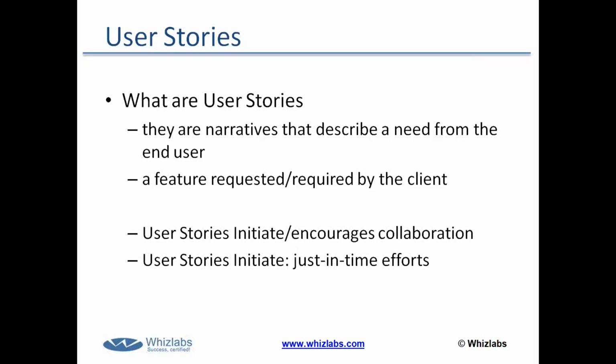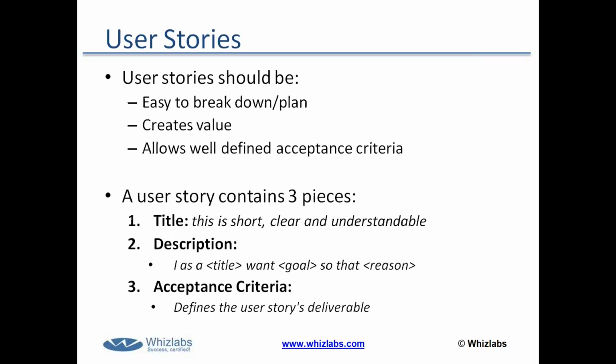The agreed on tasks for the period of time, the 30 days, that they will be developing during a sprint. They'll go back to the product owner and say, okay, this new sprint will be working on these items, which is the new prioritized list of the next sprint. They'll pull in more tasks to work on. They'll work on those items. At the end of the sprint, they'll go back to the product owner and the product backlog, and they'll pull more items. So it's a just-in-time effort.